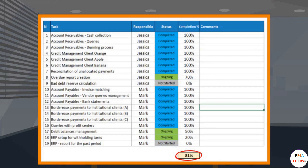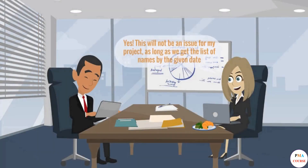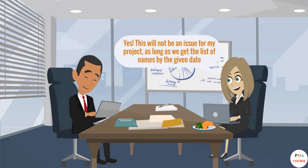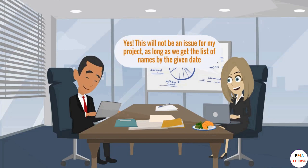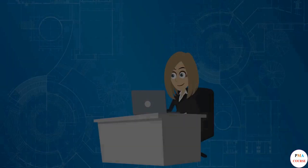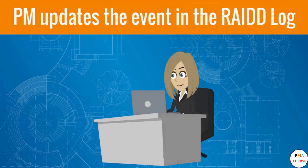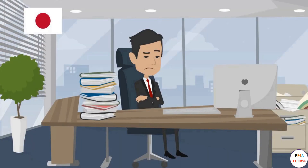This means we can provide the names the following week. Our project manager answers: 'This will not be an issue for my project as long as we get the list of names by the given date.' Our project manager then updates the event in the RAID log.